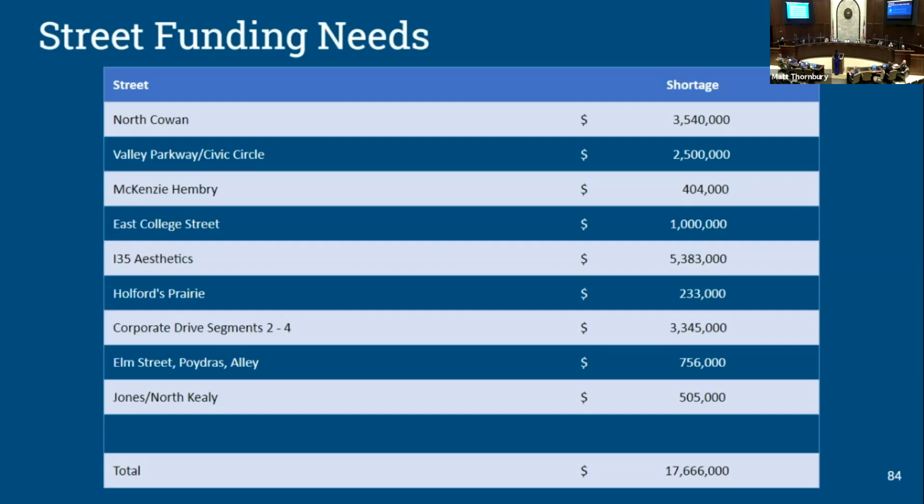And so one of the main overages that you saw was related to that I-35 relocations. That amount of money is about $8 million that we need. We'll pre-fund that through that Midway pump station money. And then TxDOT is going to pay us back for about 80% of that. So even though that looked fairly dramatic on the utility fund side, I didn't want y'all to freak out about that $8 million, that we do have that covered in a different way.